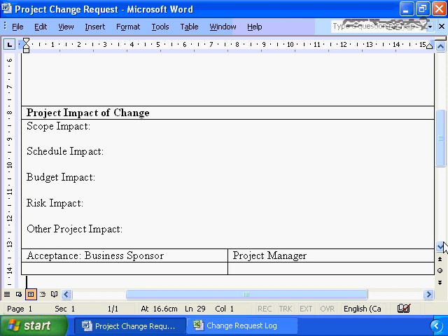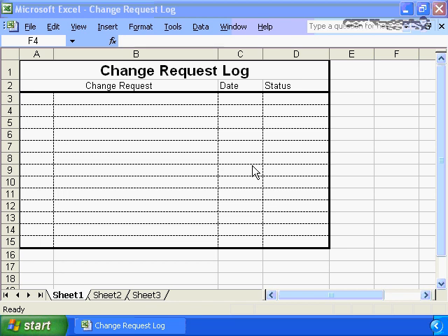Ensure that you're documenting all changes. My preference is you document all changes on something as formal as this change request log, and that this change request log is reviewed, approved, and signed off. If that's not politically acceptable in your organization, then you do it through email, or through documentation on your weekly status report. But you document these changes somewhere so that as people's minds change or people question the interpretation, you have your documentation, you have your audit trail to validate why you've taken the action you've taken on behalf of the project. The change request form is the critical part of our overall change management.